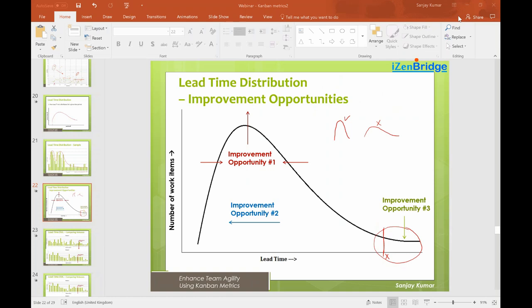Question: how can we configure the throughput chart in a tool like Jira? Jira supports CFD but not most other Kanban metrics. For those teams, I ask them to export data from Jira to Excel, then I create the charts in Excel and teach them to do it themselves. The two tools with the best support for Kanban metrics are Swift Kanban from Digite and Kanbanize — Jira unfortunately does not have good Kanban metrics support.